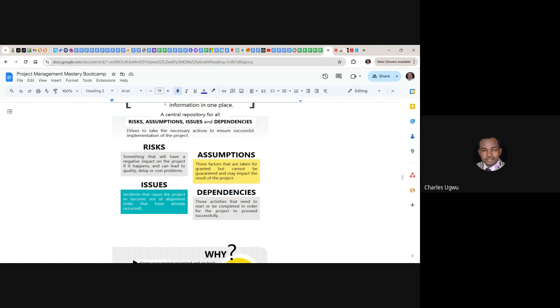When we are looking at Gantt charts and critical path analysis, we saw dependencies. We could say that some activities cannot start until others finish. So when the predecessor activity is delayed, the following activities, all of them, will be delayed. When the predecessors are delayed, the successors will all become delayed.